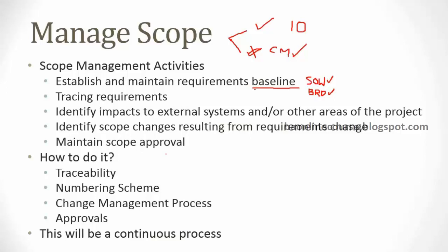You don't really need to know much as a business analyst. So what if the customer comes and says, I want these additional things coming in? You could always say, no, earlier we agreed to these 10 features in the SOW, so I'll deliver only 10. Anything additional you want, you have to raise it as a change request. Right? So effectively, what you're doing is creating a mechanism to make sure that you are not accepting anything more than what you've committed by defining this baseline document. A very simple step, right?